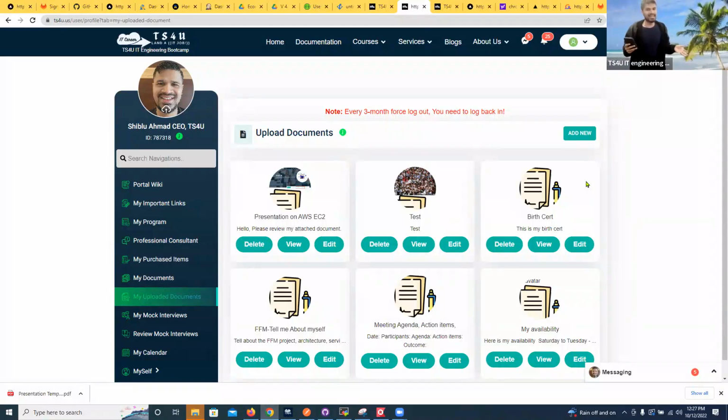If it takes more than 8 hours, it can be 2 points. It means 2 days. If it takes 3 days, it's 3 points, 3 points for the whole team. If the developer takes 1 day and QA takes 1 day, that's 2 days, so it is 2 points. It is math. If the developer takes 2 days and QA takes 2 days, it is 3 points, pretty much. 1, 2, 3, 5, like this. If it is bigger than 5, it's a problem.